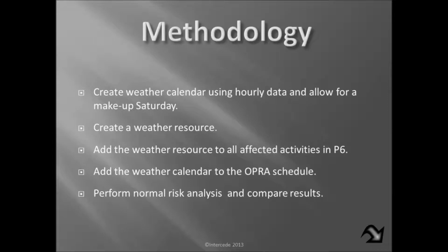And the major departure that we're going to do here between what we did with rain delay and what we're calling seasonal weather is we're actually going to try to determine the P10s and P90s. Now, for rain delay, what we did is just arbitrarily select a plus or minus 2 days.